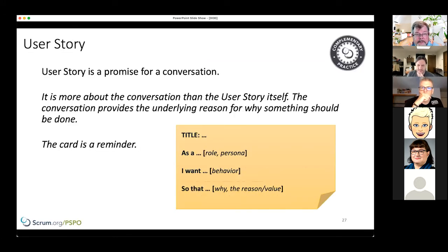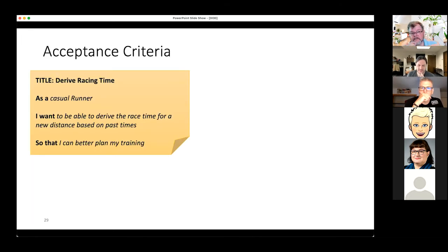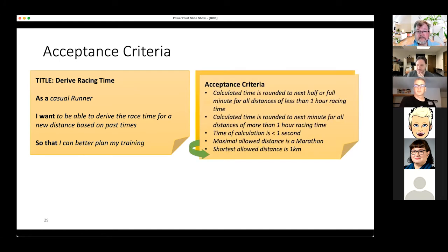I'll skip over some of this a little bit. We talked about stories a little bit. That's one way to do it. I do want to point this out: some acceptance criteria on stories. People usually write product backlog items in the form of a story. Acceptance criteria is not a definition of done. Acceptance criteria means, how do I know I'm done with that particular PBI? What are some of the things to look at? So don't get those confused.